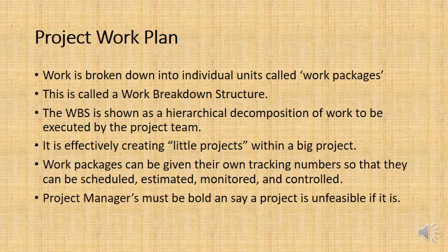And at this stage, the project manager may see that certain work packages are just not feasible to achieve. If there's the design of a very specific cantilever, for example, in one of the work packages, the project manager will realize, you know what, we just don't have the personnel to achieve that work package.